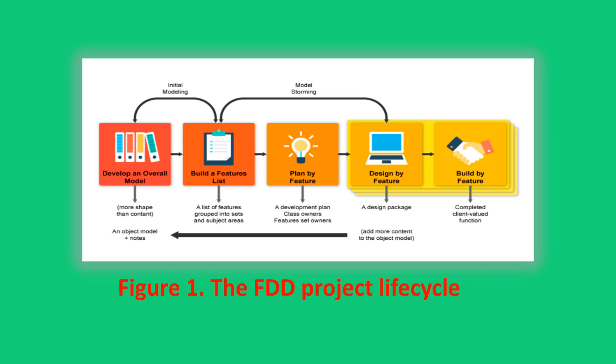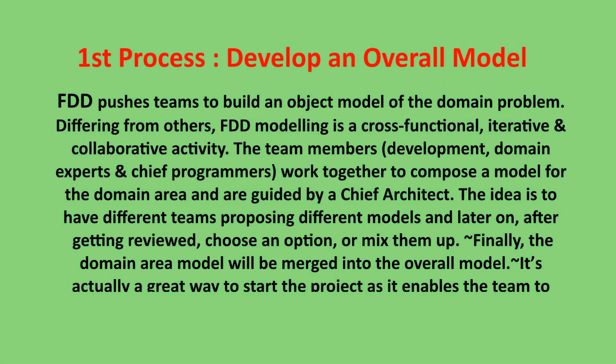The first process is develop an overall model. FDD pushes teams to build an object model of the domain problem. Different from others, FDD modeling is a cross-functional, iterative, and collaborative activity. Team members, domain experts, and chief programmers work together to compose a model for the domain area, guided by a chief architect. Different teams propose different models, which are reviewed and either chosen or mixed together. Finally, the domain area model is merged into the overall model, enabling the team to gain a strong understanding of the project and establish clear communication.